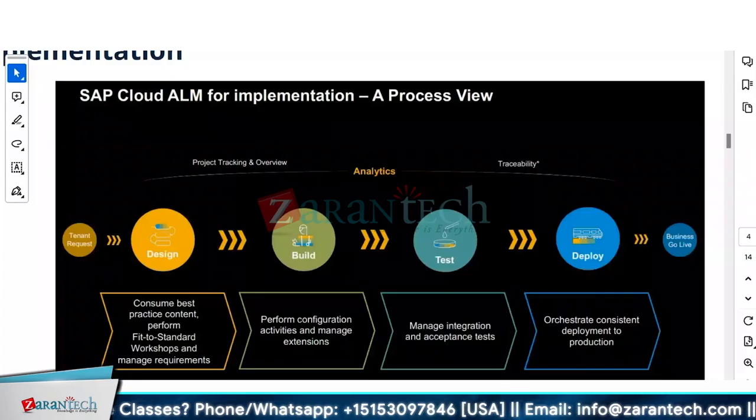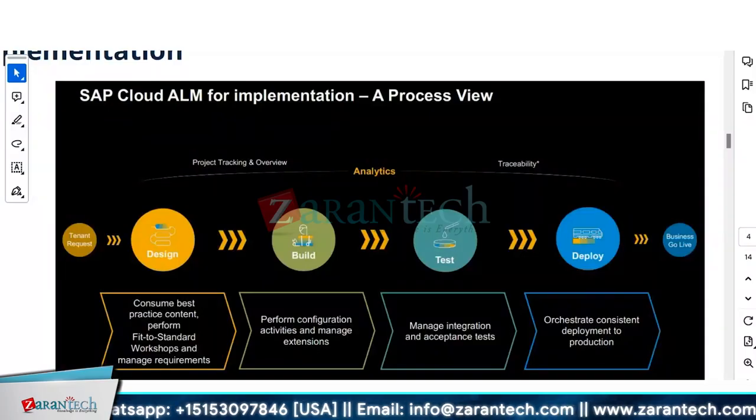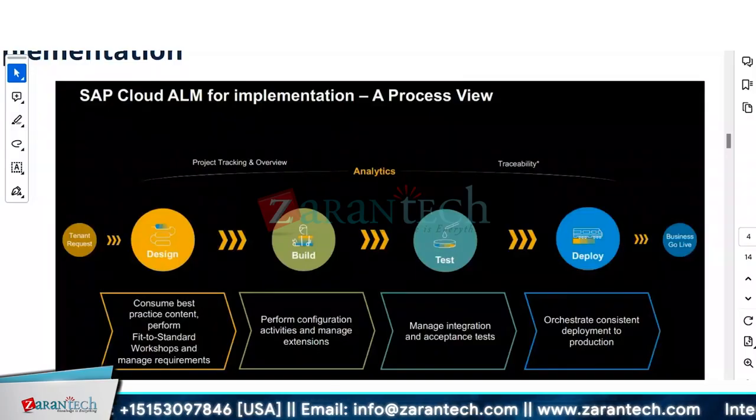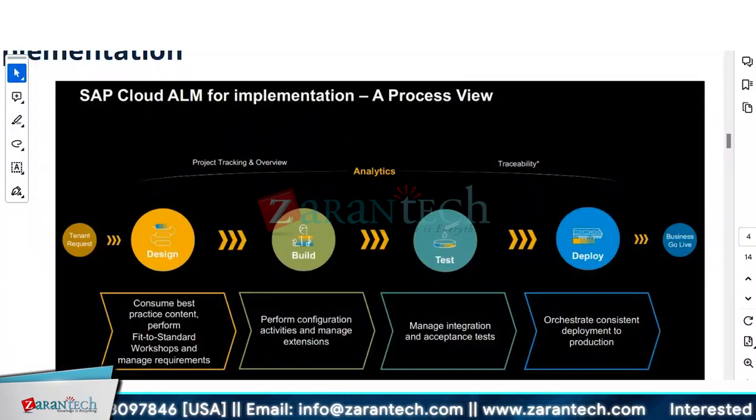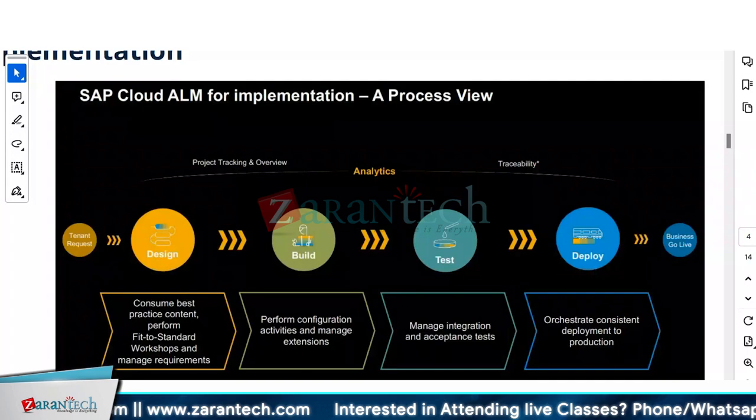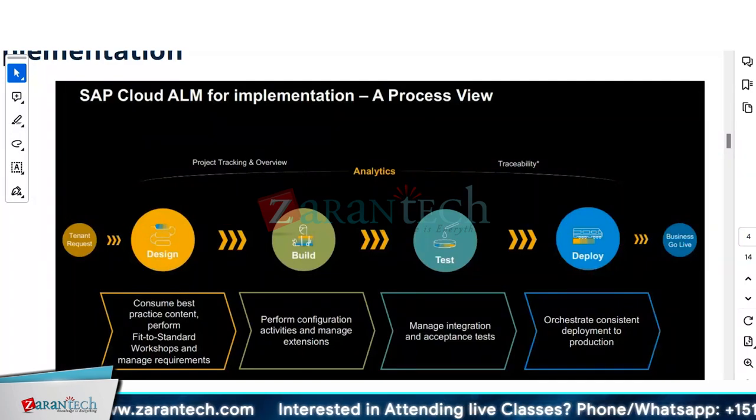Depending on the scope, there could be one module with limited processes, so its requirements and workshops would get finished quickly. Or due to some resourcing issue, the resource for some stream or module did not onboard on time, so their explore or design phase is still running. So it depends how you want to have it.